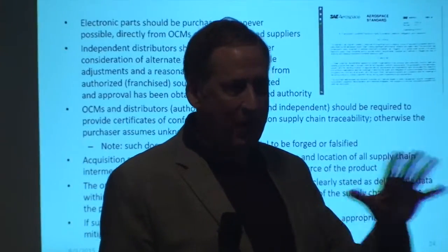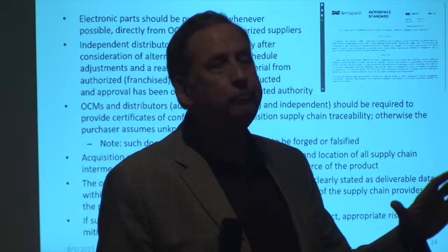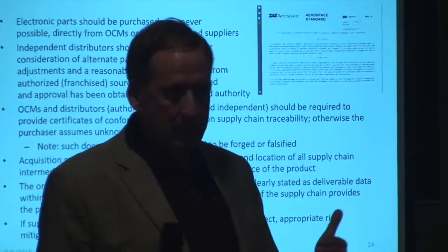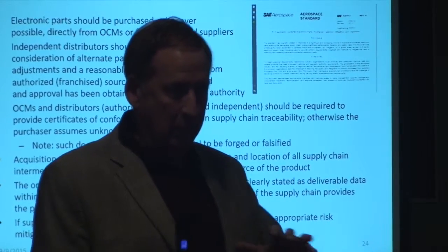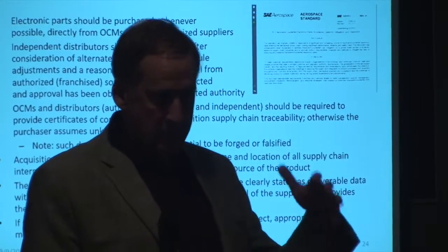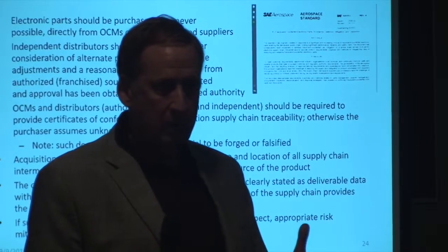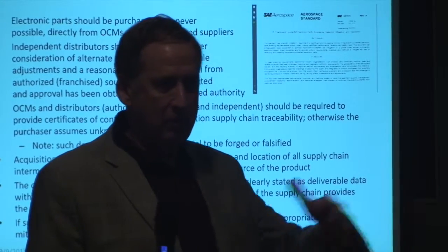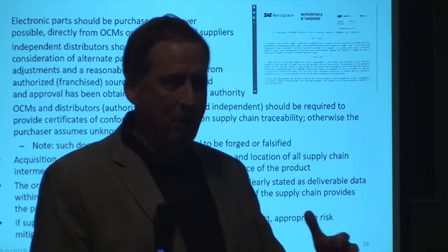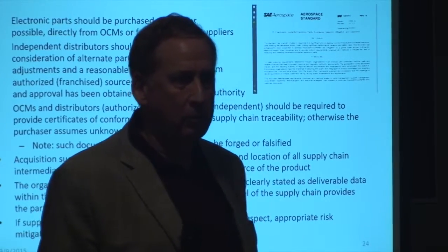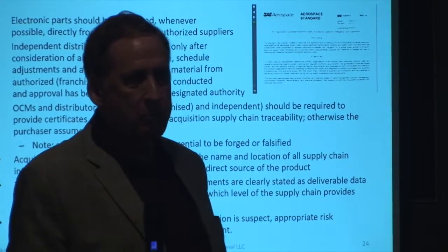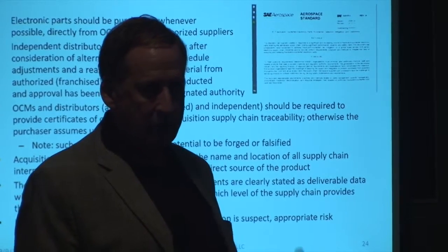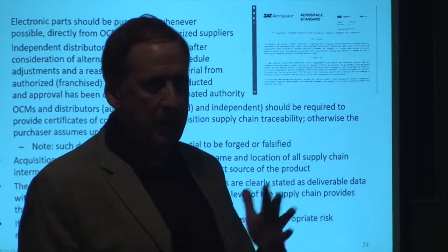However, on the other hand, from a practical standpoint, it's going to cost more. It's going to do two things. One, it's going to drive the cost up because you're limiting the number of places where you can go buy the parts. The other thing is lead times are going to increase because you've got more companies trying to go to the same guys to buy the parts. So it is a real issue, especially with the pressure because of sequestration and affordability to drive costs down, and this would appear at first glance to be in the opposite direction.